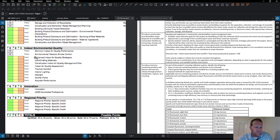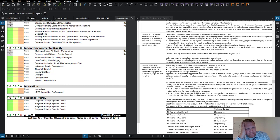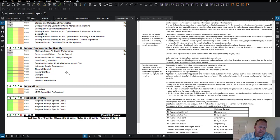Low-emitting materials are addressed in the specifications, but during the submittal process the contractor has to collect a lot of information about the products being used on site and verify that they have low-emitting, low-VOC content.